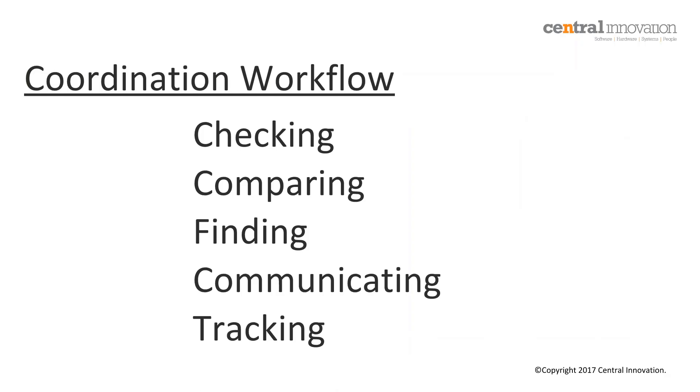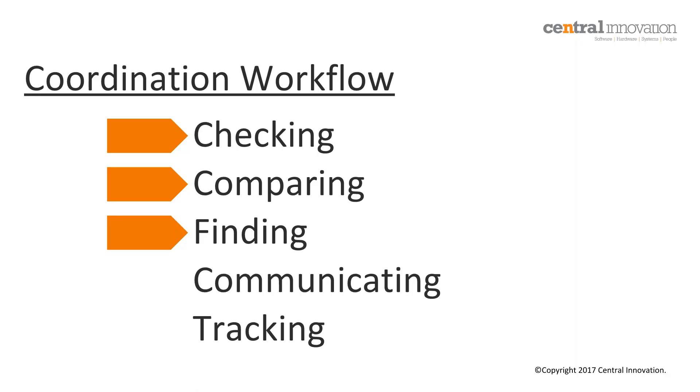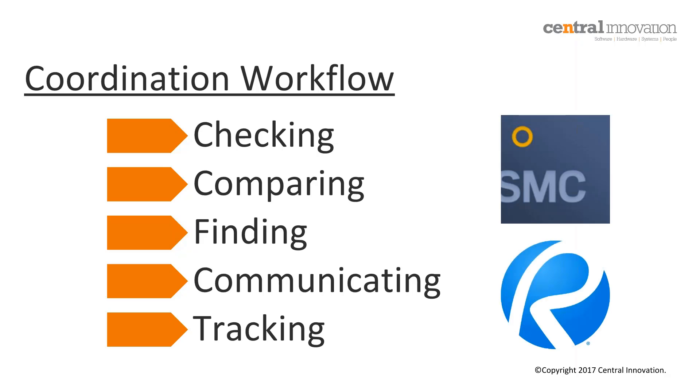So knowing that we have all of that checked in, we can then be confident that all the designs are in line with the overall design intention and that's going to help you save time and predict issues, changes and future RFIs during construction. The coordination workflow typically goes through an iterative process of checking a design, comparing the different versions of the designs across different disciplines, finding issues, communicating the issues you just found, and tracking those coordination issues until they are actually solved.